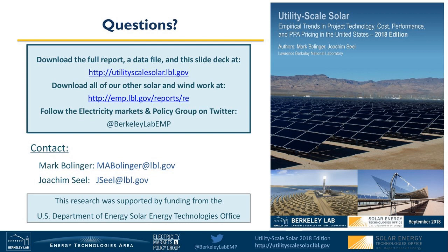Another question was whether there are big cost differences between low voltage and high voltage systems. I'm not sure it depends so much on the voltage, but on project size in general. Smaller scale installations, those smaller than 5 megawatts AC, typically have higher upfront costs, just because they are often installed on more difficult terrain or cannot fully capture the economies of scale that are partly evident among utility scale solar projects.